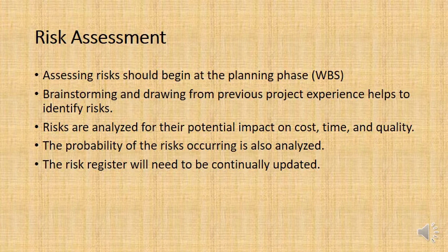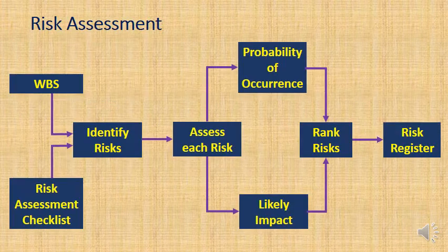New risks are being added, old risks are being eliminated if they're no longer risks. The size of the impact is reanalyzed and given a more accurate value. The probability is refined further, and so it's an ongoing process. So this is basically what the risk assessment will look like.